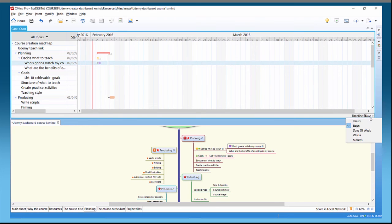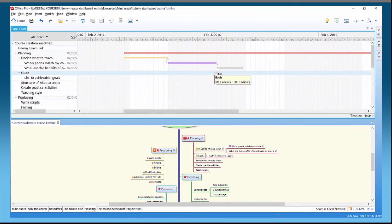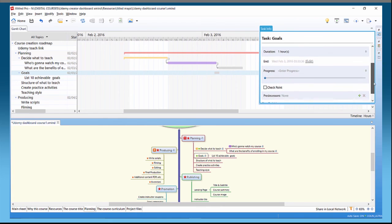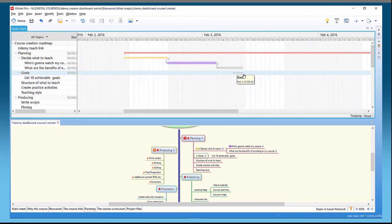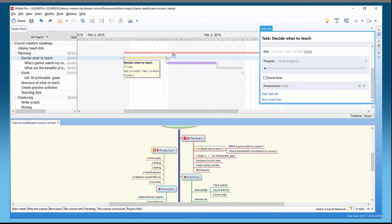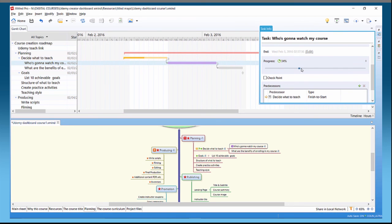On Goals, for example, I can drag one out and double-click to make it a checkpoint rather than a bar — a small triangle that I can place wherever I want on the timeline. These little triangles are checkpoints. On any task, if I set progress on 'Decide What to Teach,' you'll see a slight color change — say 48% — giving two tones of color. On 'Who's Going to Watch My Course' I can also add a percentage progress, shown with two different tones of the same color.